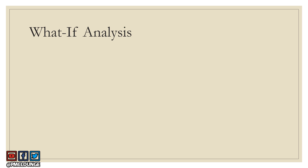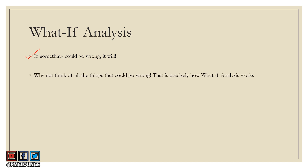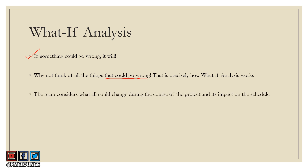The first tool we're going to discuss is what-if analysis. There's a famous quote that says if something could go wrong, it will. To counter this, you think of every single thing that could go wrong. Basically, you sit with your project team and consider everything that could change or go wrong during the course of your project, and what its impact is going to be on the schedule.